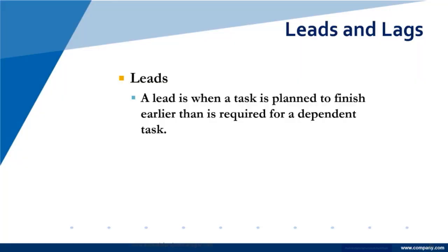We can't always do it, but that's our goal. With leads, you have a lead. It's like, I'm going to come over and cut down your tree. Now, I know that the person that's going to cut up the tree is not going to be there for 10 days. But in your project plan, you can put down that I cut down the tree on day 1 and 2. But they're not going to clean up the mess until later.